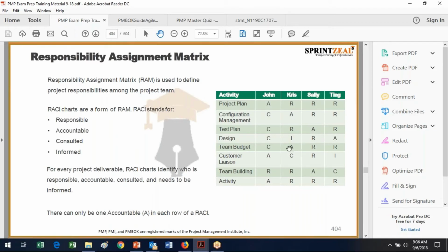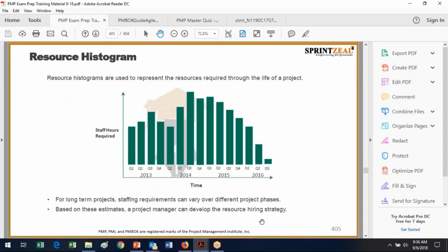So you notice there's only one person accountable, because PMI is very much about the buck stops here. This person is particularly in charge. And remember when we did our WBS breakdown and we went down to work packages, but then below work packages, we got into activities, because activities are the one-person thing linked to that. Yeah, we don't have the 'oh, I was waiting on person A, or I was waiting on person B.' The buck has to stop. And so just like only one person can be accountable for an activity, PMI wants the buck to stop. And again, in terms of the project manager, it's often with the project manager. Okay, another thing we can look at is the resource histogram.